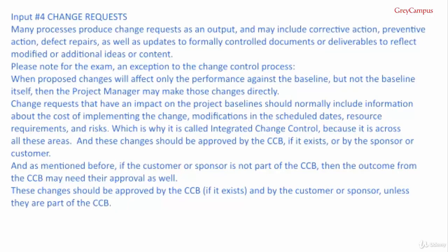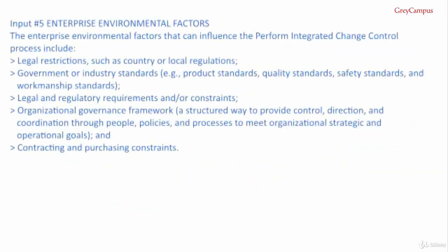And these changes should be approved by the CCB, the Change Control Board, if it exists, or by the sponsor or customer. And as I mentioned before, if the customer or sponsor is not part of the CCB, then the outcome from the CCB may need their approval as well, and that turns up in the examination from time to time. These changes should be approved by the CCB if it exists and by the customer or sponsor unless they are part of a CCB. And lastly, only approved changes should be incorporated into the revised baseline.